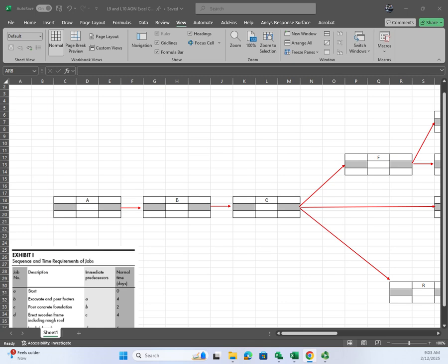That's why it's important to know the predecessor to an activity, because you go back to that activity to pull that time forward. So if Kyle finishes something on week 6 and Robert's supposed to start it the next week, he can start as soon as you finish week 6. So that Friday you could start.